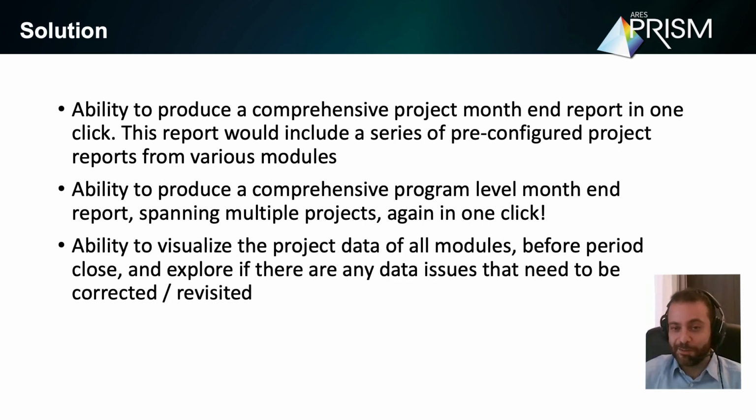And then you also have the ability to visualize basically this data before you give it to your PM as a controller. So that's a lot of data integrity checks, data issues. Some types of reports are specific for data checks, so you can actually view those. Once you visualize the data, it makes a lot of sense. You're looking at, oh, why are my actuals higher than my forecast, for God's sake? So I would have a negative to complete. You will view that to be in red anyway. So you can see these type of issues.